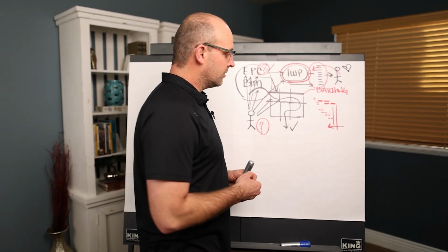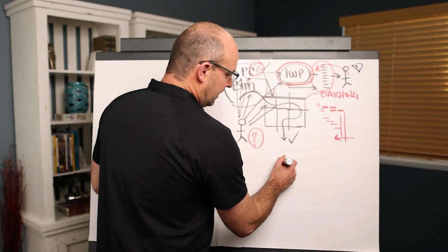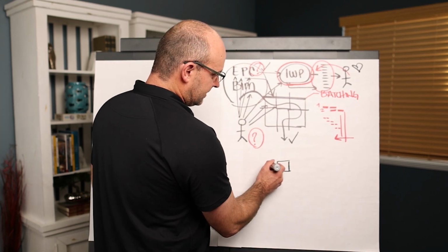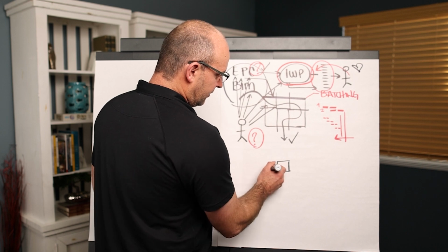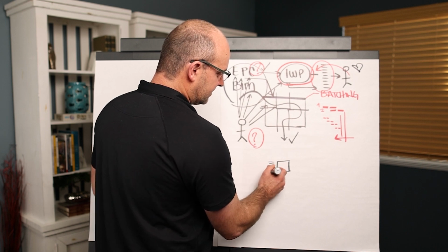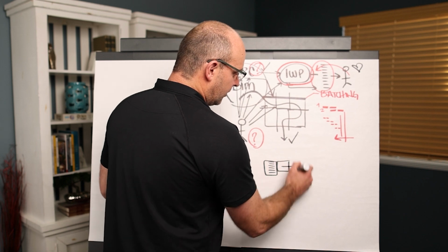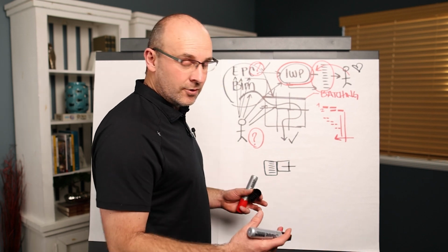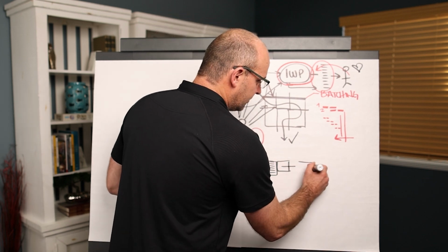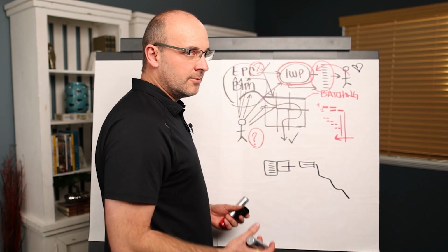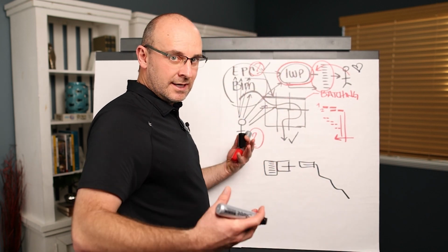people think that advanced work packaging is simply breaking down in your work breakdown structure the design, the procurement, fabrication, delivery, and installation and inspection all in their own work breakdown structure categories, summarizing those into blocks, and then looking at your CPM schedule in a more summarized way to where we align the supply chains.